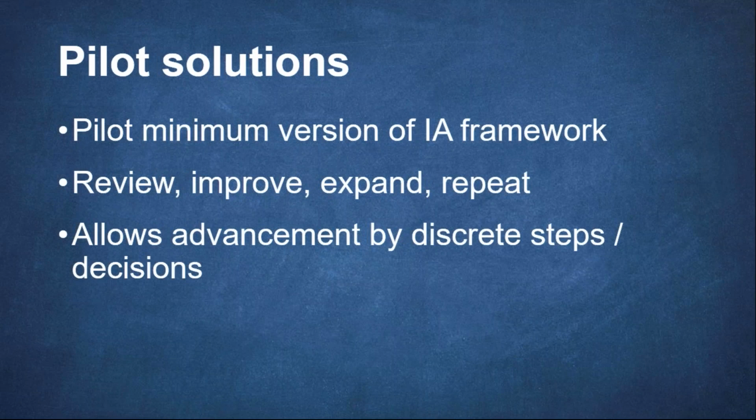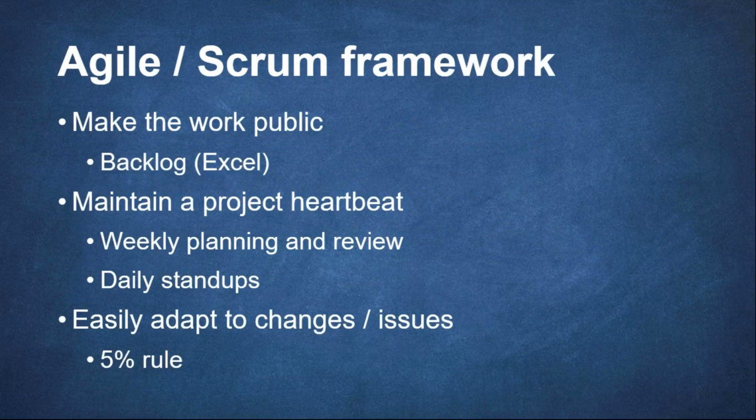Okay, so once we've tested and accounted for any issues that we might encounter, along with the duration and user experience, we move into piloting the solution. This is the next step in having a select group of users actually using the solution, making sure that it works for their needs and that our assumptions are correct. If there are any issues, we review them immediately, improve, and then move forward. The goal of this stage is acknowledging that we don't know what we don't know. Until you actually start using the solution with production content in your day-to-day, you may not be aware of an incorrect assumption or any other potential issue. If there aren't any, great, then you move on. But it's important that you don't skip this step.